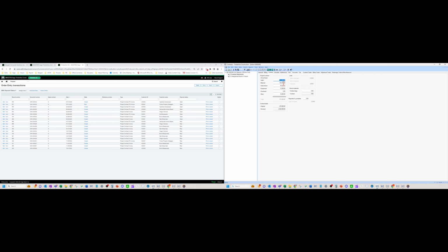Okay, so what the system does, if it says cost plus to maximum here, is if I bill over the revised contract total, so this had some changes made to it, change orders, then it's going to stop me at a point, but it really doesn't warn you until you get pretty far along the process, okay?